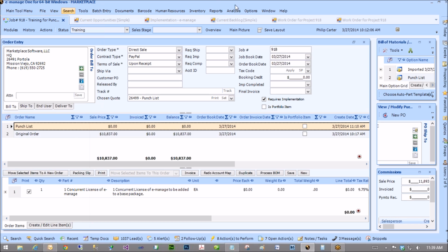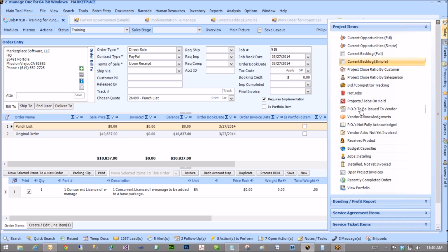No matter what, if you want to go out and do service and it's not part of an existing project, you should be doing a quick quote. Because you don't have a separate service department, you're looking at 2 different calendars for the same people, and that doesn't make any sense. You're also looking in 2 different places on the Today screen: open service tickets and your current backlog. Whereas if you handle it all through projects, you're only looking in the current backlog. And you have all the things available to the project that aren't on service tickets, like action items and stuff like that.